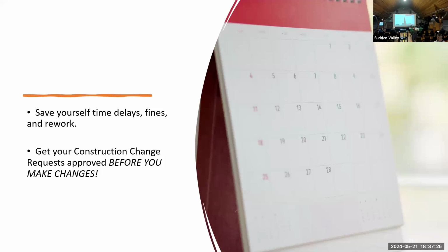So we would come out during a final or another inspection, and then you have to jump through that hoop. It adds maybe a 3-week delay until you can get that ACC approval. I cannot approve things on site.